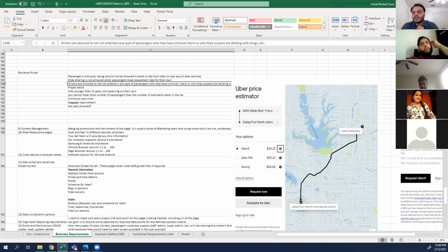In waterfall, it goes phase-wise. You have an initial phase, then requirement gathering, then design, then development, then testing, and then implementation. It all follows in sequence. 2 months in the initial phase, 2 months in requirement gathering, 2 months in design, then development, testing, and implementation. On average, a project takes about a year before it can hit the market or customers start using it. Agile is very different. In Agile, you deliver things faster, and when you want to deliver things faster, it does not give you time to write documentation.